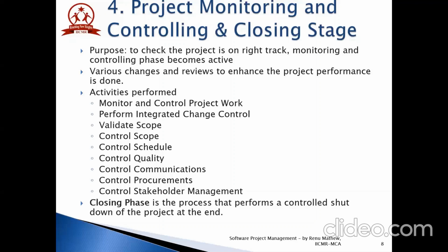The control quality ensures that the project and product are delivered in accordance to the quality management plan. The major output of the control quality is quality management plan. The other information that will be helpful are existing flowchart, upper and lower control and specification limits contained within the control charts. Information is referenced such as sample criteria, sampling numbers, measurements, and variable sampling. Quality metrics, which is a standard measurement to meet the quality requirements.